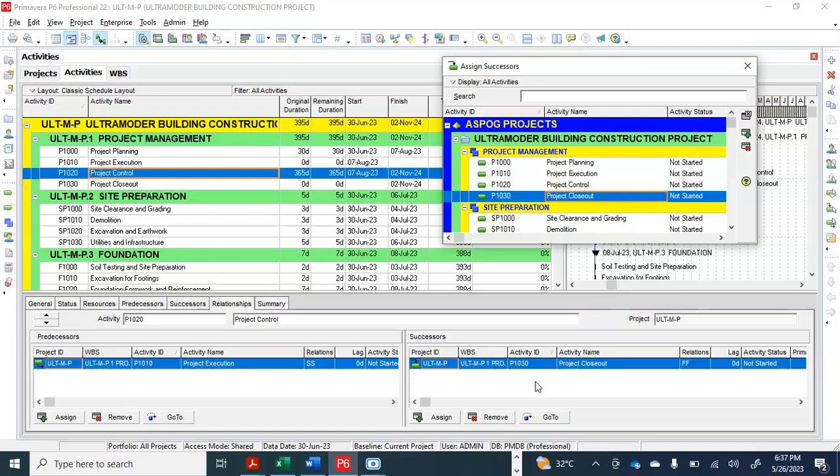After you assign, look at the table view down here. You see predecessor and you see successor. You discover that most of the activities have been taking shape, linking to each other. Some people prefer linking from predecessor, that's backward. But me, I prefer linking forward. If I'm going in front, you'll be seeing the predecessor of each activity. I prefer linking from successor, not predecessor. I don't know if it's clear. Once that is done, you close this wizard.